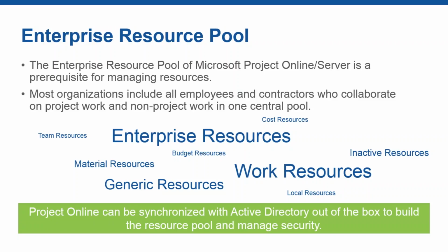Now, without going into more detail here, there's one key point we wanted to make at the bottom of the slide here, which is that this enterprise resource pool sometimes could be quite a bit of work to maintain, but out of the box with Project Online, you also have an Active Directory sync to populate and maintain the resource pool automatically based on Active Directory, as well as manage your security. So you can configure that out of the box depending on your needs.